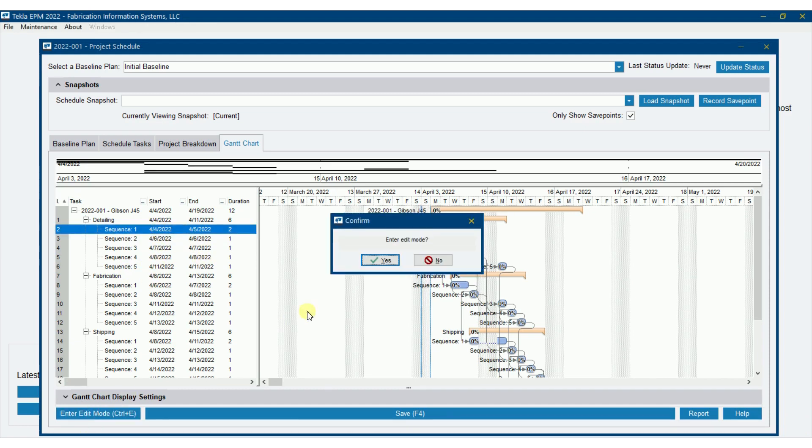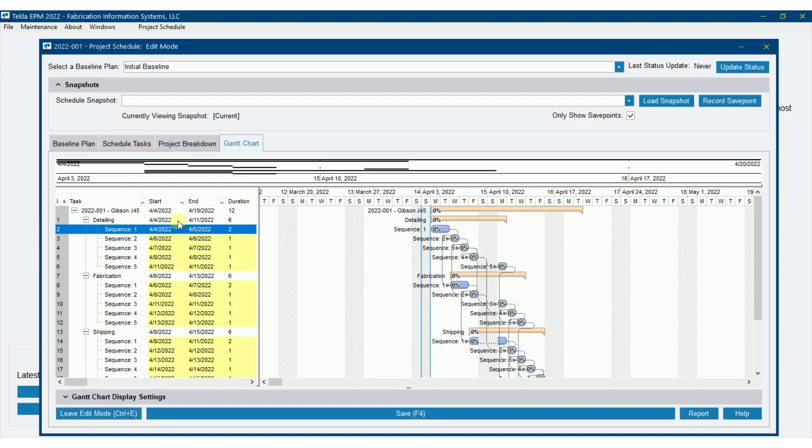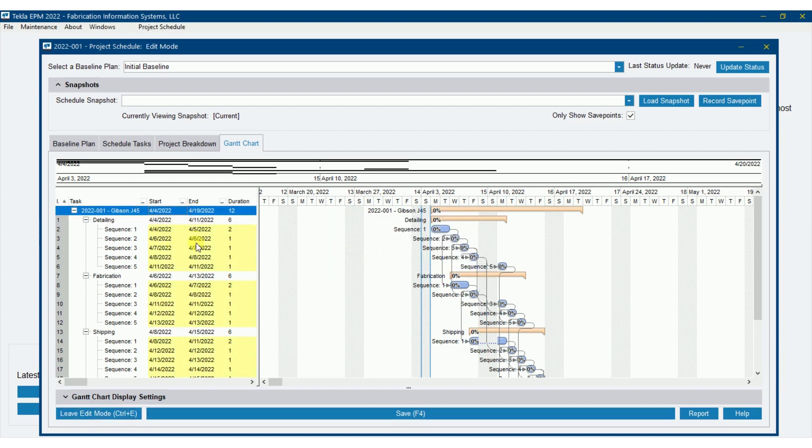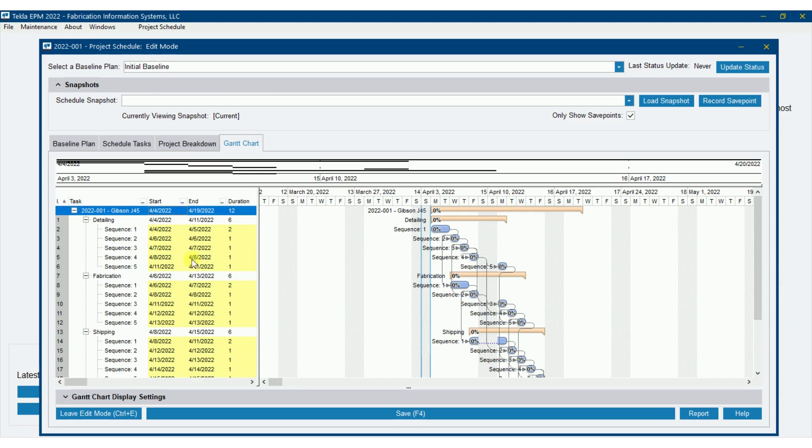I'm going to do inter-edit mode here. What I'm going to do, anything in yellow is something that you can change. In other words, I can't change the summary task, the detailing. I can only change the child task.